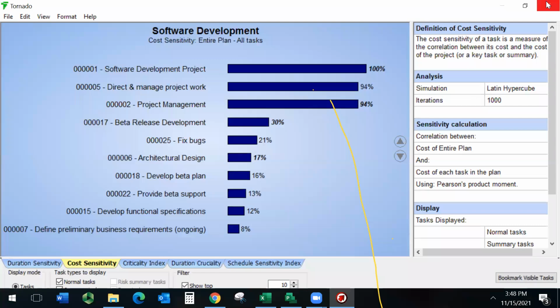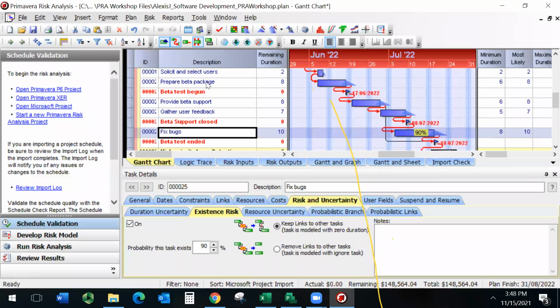Professor, I just wanted to ask a question. I'm sorry to jump in. For the critical tasks, if there are two critical paths in the project, can we think of a supercritical task at that time? No, I wouldn't call it a super critical path. What I would do is take a look at the critical path with the highest probability of occurrence.